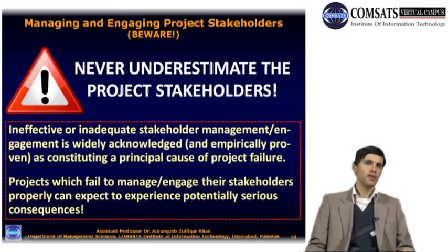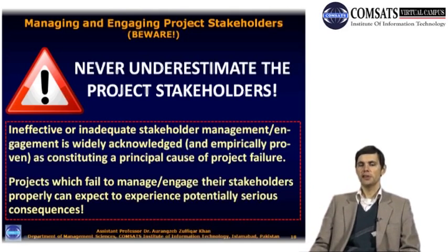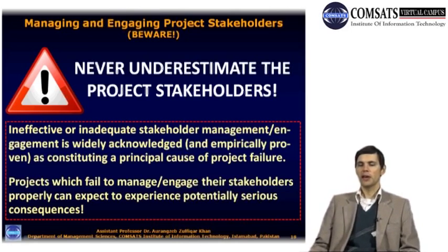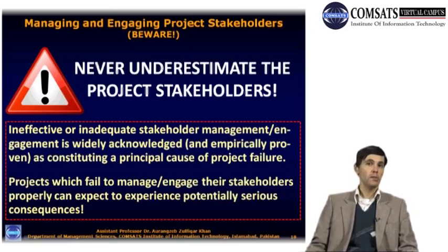And actually, if you look at the project performance surveys which have been carried out over time in many places, in many countries, in many different categories of projects, you will see that ineffective or inadequate stakeholder management and engagement is widely acknowledged and empirically proven as constituting a principal cause of project failure. More often than not, it's not the technical issues which result in project failure, but it is the failure to properly manage and engage your project stakeholders.